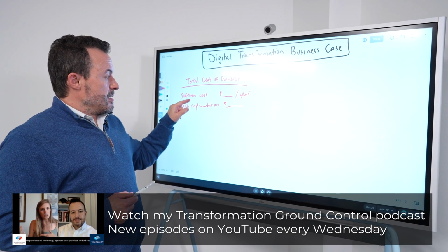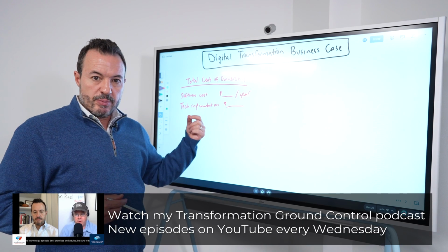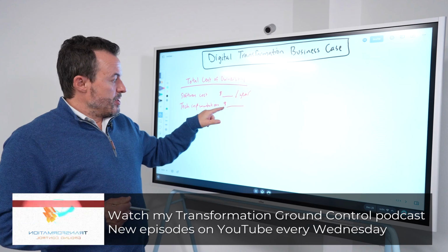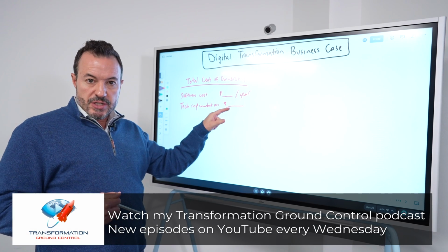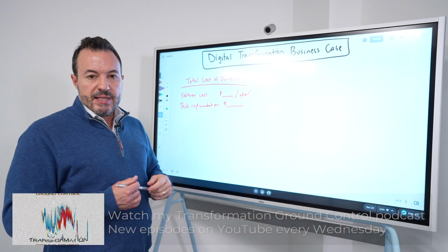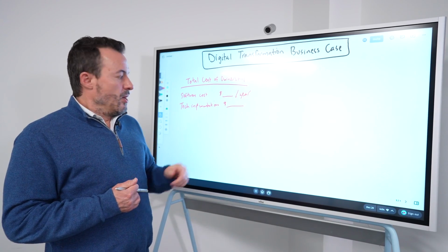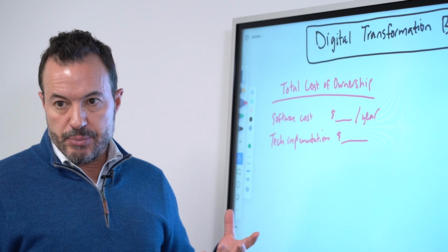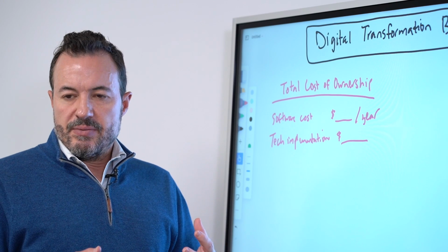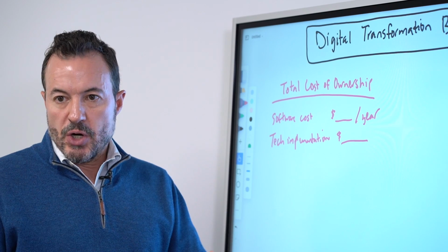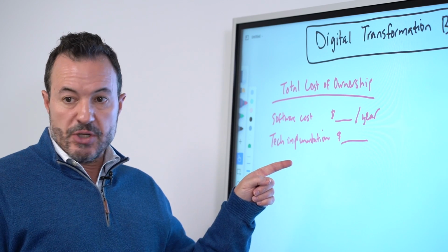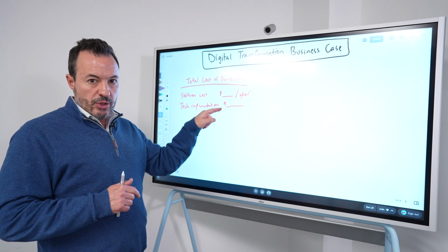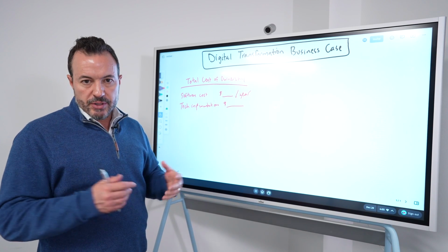What I will say is that in most cases, the proposal that you get from software vendors or technology providers are going to underestimate this cost. So typically what we do is we'll add some sort of buffer here or contingency to allow for the unknowns, the things that the software vendor may not be considering. We also really dig into the assumptions behind this cost to make sure that they're realistic. If, for example, we find that there's an assumption that you have 40 full-time people committed to the project and that's how they came up with their cost estimate, but you know you can't commit 40 full-time people to the project, then you need to rework that and figure out what is the real cost if we only provide 20 full-time people or whatever the number may be.